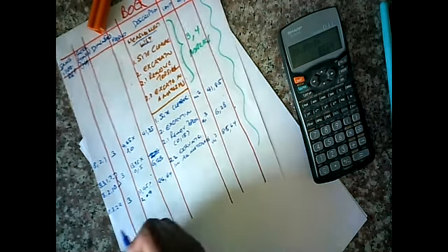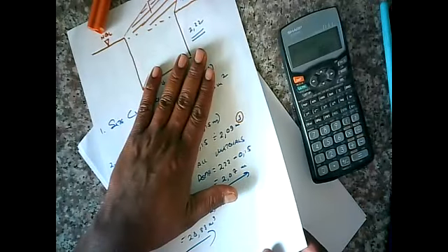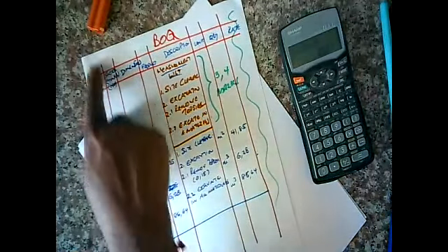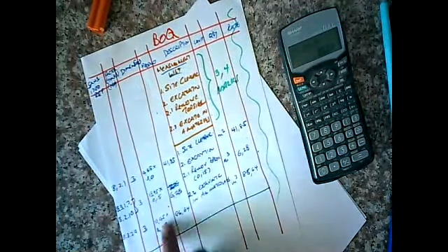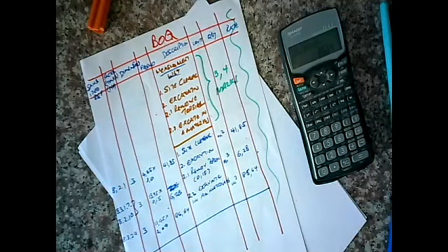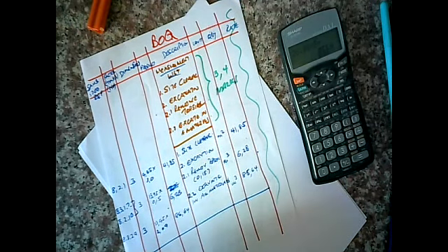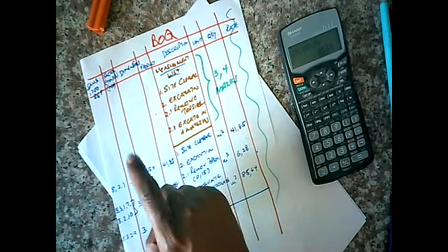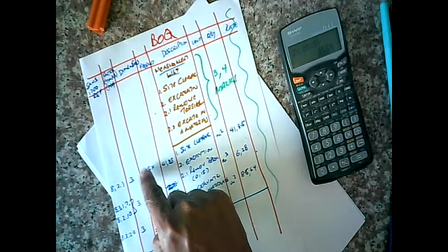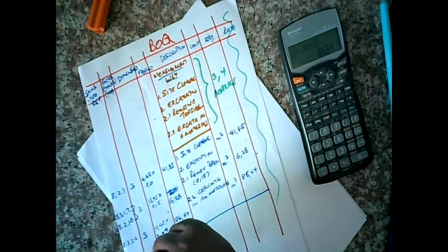All right, so there's our calculations. And this is how you tabulate them in the bill of quantities. Notice SANS 1200, the factors are the number of structures, dimensions. Now, I get this question all the time: do I put in every single dimension? Sometimes it's not practical to put in every single dimension because there are multiple dimensions. Here, just 2, L times B. You put in what you believe is relevant. There's no marks attached to this. The marks are here and here, and the explanation is there in the form of a description.